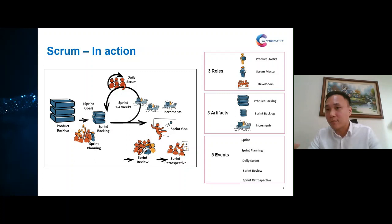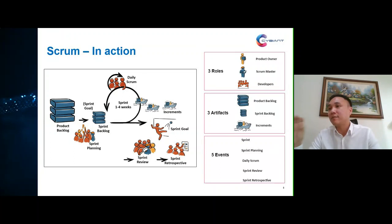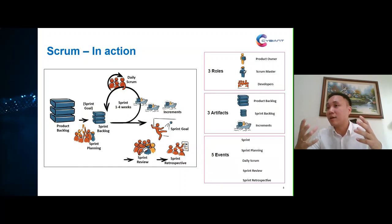During the sprint review, the team gathers feedback from stakeholders. Before the sprint ends, there is also a sprint retrospective — a time for the scrum team to reflect and discuss how they can improve in terms of quality, productivity, and efficiency for the next sprint. That, in summary, is how scrum works in practice. After this I'll explain the three roles, three artifacts, and five events in more detail, and then relate how scrum works using a real business case scenario.